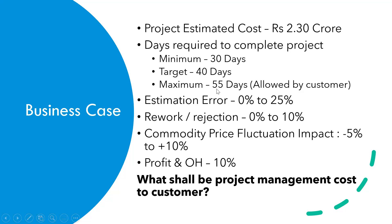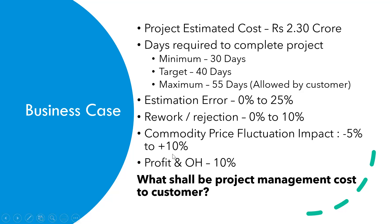Based on past experience, they are predicting the estimation error could be up to 25 percent — based on past projects they have executed. Then they want to consider a rejection of around 10 percent which the company has to spend, and for rework or anything they are keeping another 10 percent as a margin. They are also expecting commodity price can go down or increase, and the impact on the estimated value could be around minus 5 to 10 percent — so it can be on either side.